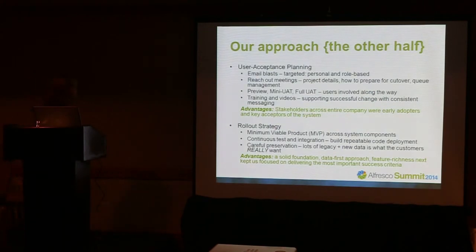The other thing I think that's important and part of that blue box is just the idea that rollout strategy was critical. And I think if we learned anything from the project, we perhaps let the idea of migrating the legacy content into the system a little bit late in the process. We did okay. We ended up creating a platform where they can do a merger and acquisition and bring that content back in. But certainly the content itself was more important really than anything else. And we needed to make sure that we had that careful preservation of the content. I already talked about the continuous testing and integration. That was part of that, how are you going to deploy code idea.